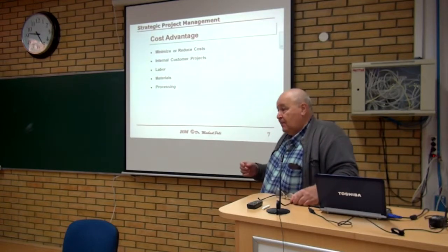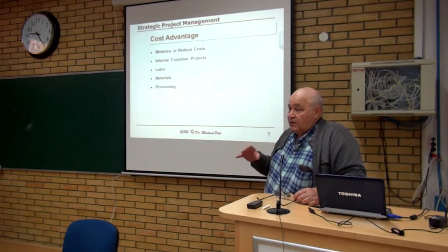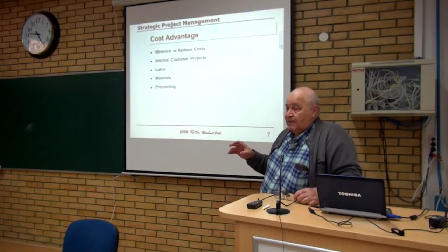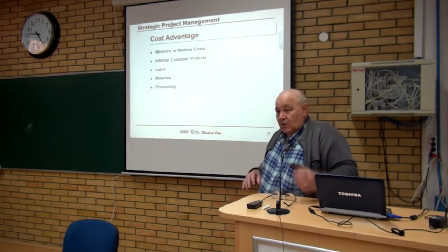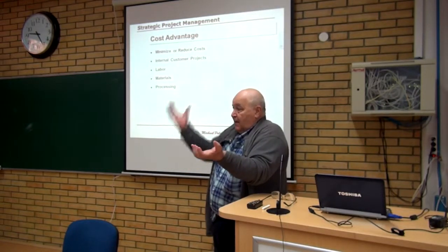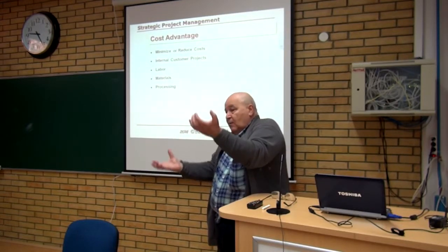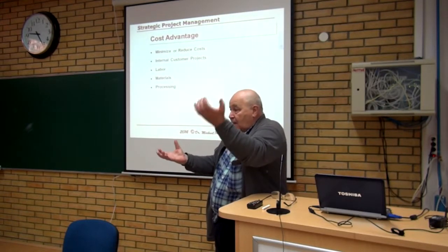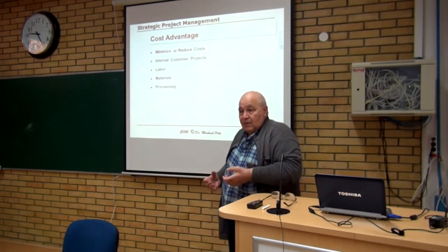You have to remember, every project has a cost associated with doing the project and a benefit that will be attributed to the result that the project creates. So I'm going to spend this amount of money to get this kind of benefit, and this benefit can be equated into dollars. And so we balance how much it cost me to make the deliverable versus how much I'm going to get back from it.